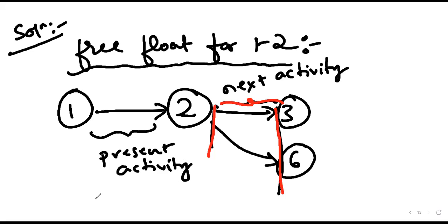What is the early finish for 1-2? 10. Early start of 2-3, 10. Both of them it is 10 itself. Yes, correct. So there is no possibility that this will change. Both the values will be equal.